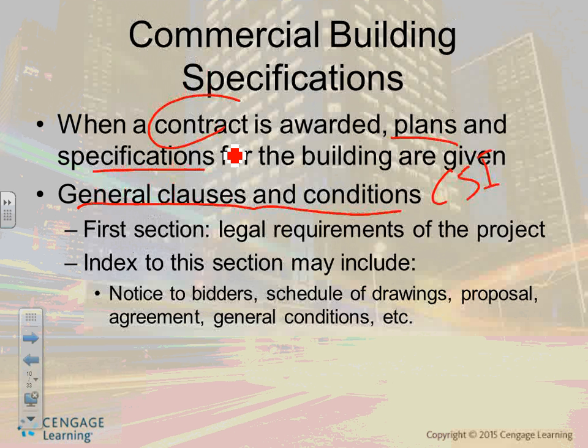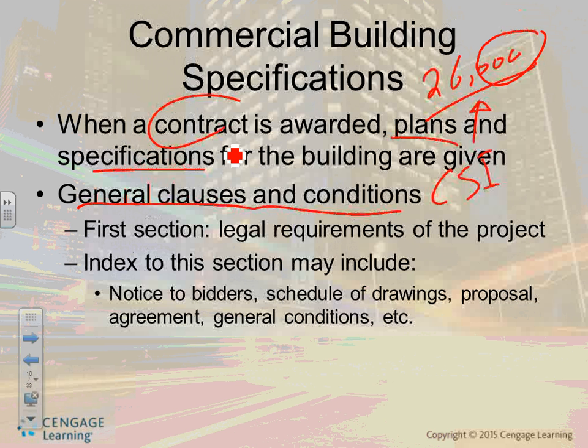So CSI. As we go into the spec, I will give you guys a list of how they label. It's a book. Just the numbers of the specifications for all the disciplines is a book, close to an inch thick. So CSI specifications, for us, start right now with 26. Every specification that starts with 26 gives you almost 1,000 electrical specs, from 00001 all the way to 1,000.